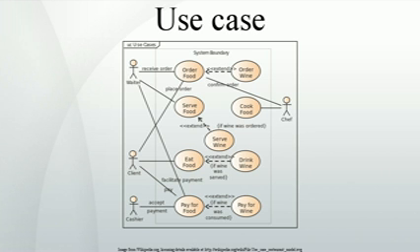It provides a look-ahead mechanism, so the stakeholders can spot issues that are likely to take a long time to get answers for. These issues can and should then be put ahead of the schedule, so that the answers can be ready when the development team gets around to working on them. The use case extension scenario fragments provide answers to the many detailed, often tricky and ignored business questions. What are we supposed to do in this case?